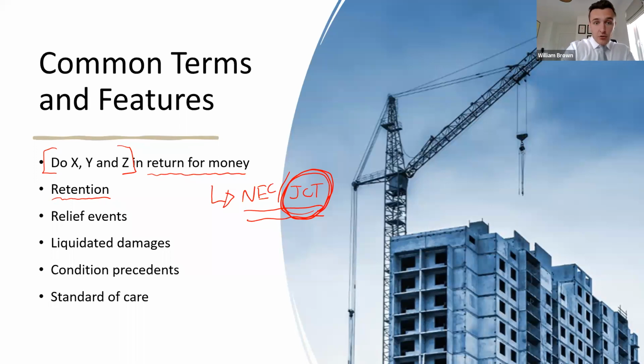The NEC, in contrast, does not have that wording, Thomas. So under the NEC, the wording or the money itself is not deemed to be the contractor's. So if the employer went insolvent at that point, it could be an issue for the employer in recovering that. The only way they could potentially do it is to try to mount some sort of argument in the law of trusts that the employer's interest in that money was only fiduciary in nature, but there's no express wording to that effect, and it can be difficult.